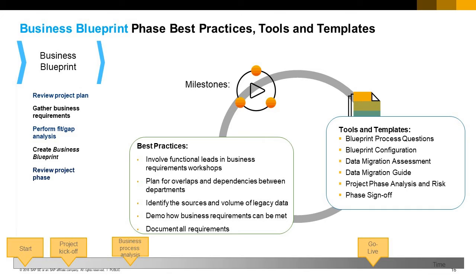During the workshops, you should identify the sources and volume of the legacy data that needs to be migrated. Use SAP Business One during the workshops to demonstrate how business requirements can be addressed by the system. Document all requirements in the business blueprint and make sure the customer understands that this is the scope of the